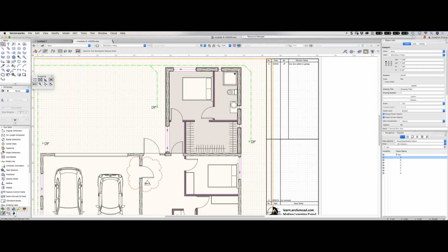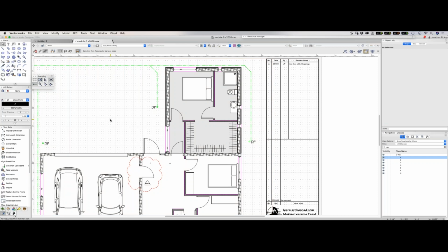But what I would tend to do is issue the complete set of drawings again instead of just issuing one or two drawings. So it would be today's date, and it would be all the revisions that were done today. And I would keep that as a set. Maybe I can show you that. So let's do a publish.